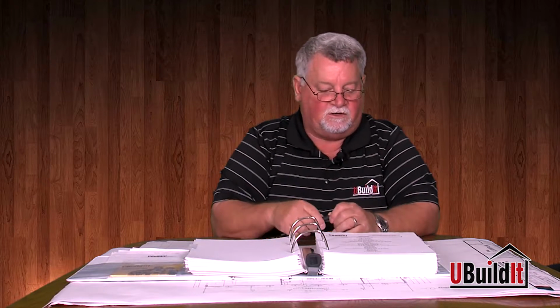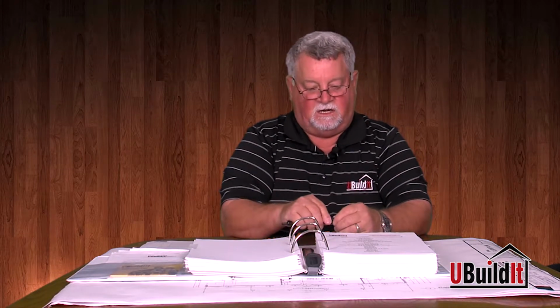We are in no way recommending any of these subcontractors. The way these subcontractors got in our book is they called U-Build It, and they wanted the opportunity to bid on our projects. In order for them to get in the book, they had to do a couple of projects for U-Build It clients without any issues. They had to provide us a copy of their general liability and workers' comp insurance. Since we're not a builder, we don't enforce that we have general liability and comprehensive insurance on each one of these subcontractors. So it's your responsibility as the builder to ask for that, to make sure that they have general liability and workers' comp before they set foot on that job.